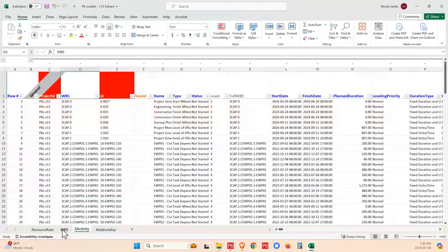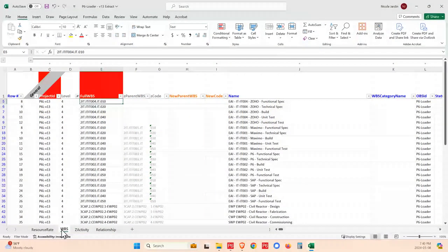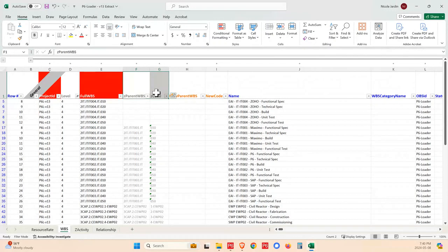Now, we also improved the way that we give you the hierarchies. So if you've used P6, you know that a lot of coding inside the system is hierarchical, which allows us to do roll-ups from the EPS structure, OBS structure, the codes, activity codes, the resources, roles, you name it, it's almost always hierarchical, which is great. But if you're trying to create that structure, it can be a little tricky. You have to make sure you know what the parent is and what the child is.